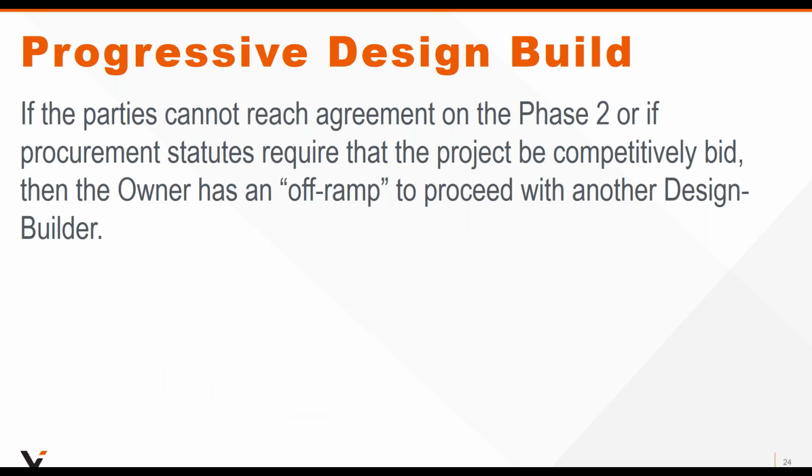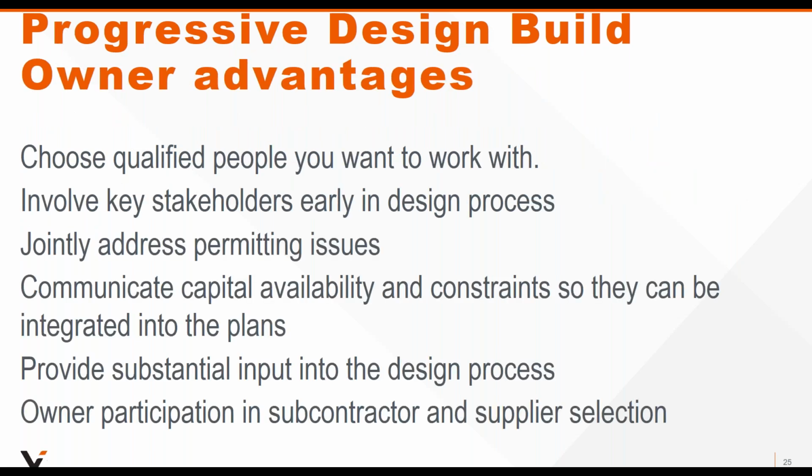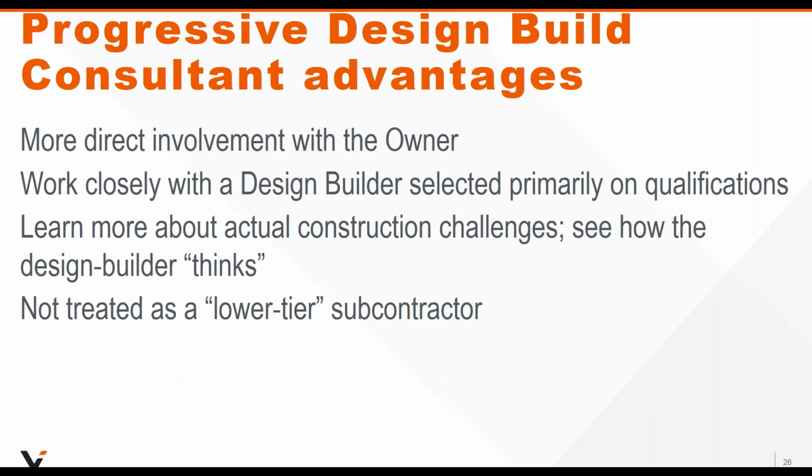If you can't reach agreement on the phase 2 services, or if procurement statutes require that the project be competitively bid, then the owner has an off-ramp to proceed with another design builder. And that's where you have a more detailed set of drawings. The owner has a more realistic set of expectations. They can plan their capital budgeting accordingly. And it allows for better capital budget management for the owner. So those are the advantages.